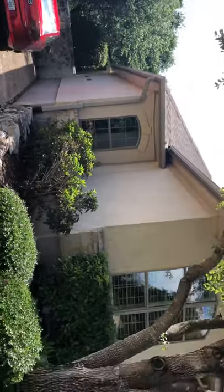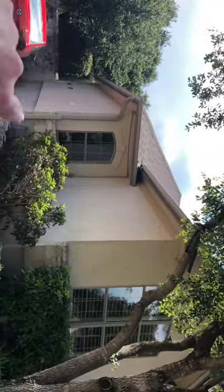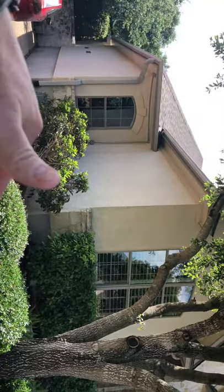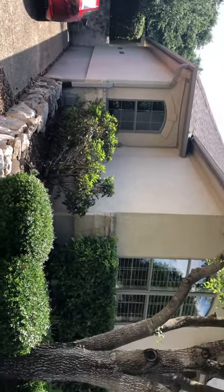We're not doing any stucco or mortar repair beyond that one patch. They recently — within the last couple of years — had the soffit and fascia painted, so we're not doing anything with gutters. We're basically doing from the roof line, including the soffit, down on the sidewalls. That's our scope of work.